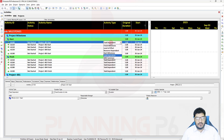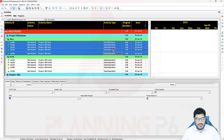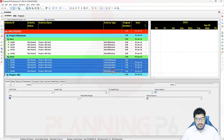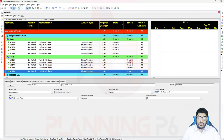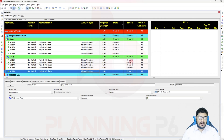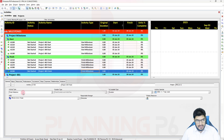Apply the Activity Type column. You can see here the activity type is currently 'Task Dependent.' I will move the start activities to 'Start Milestone' using the fill-down option, and the finish activities to 'Finish Milestone' using fill-down as well. Start milestones have a start date only, and finish milestones have a finish date only.